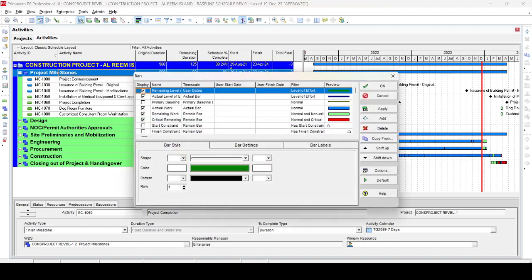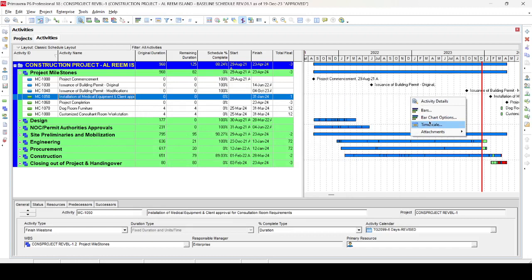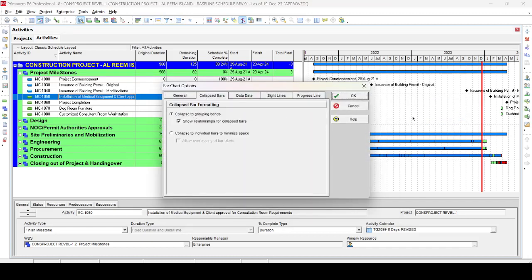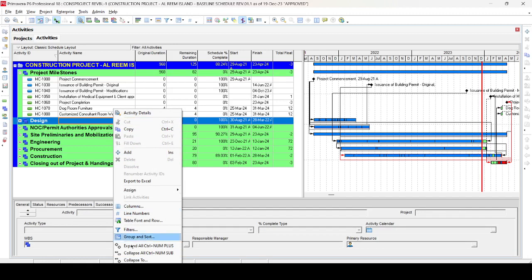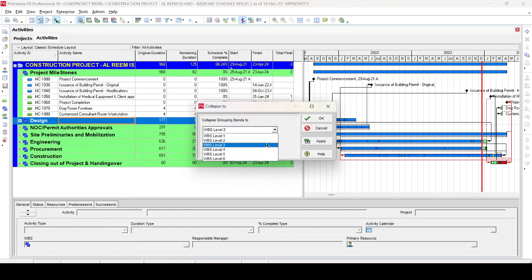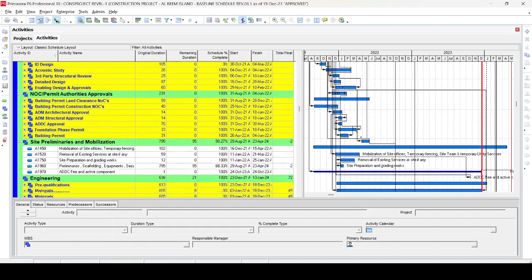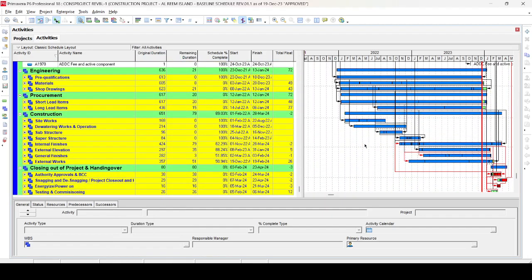Right-click again on the chart and select the Show Relationships dialog box option. It will show you the relationship lines even when the program is summarized. This is very helpful when making a summary program to present to management for their understanding or approval. You can also right-click and collapse to Level Three — you will see that more relationship lines are shown even in the summary program.